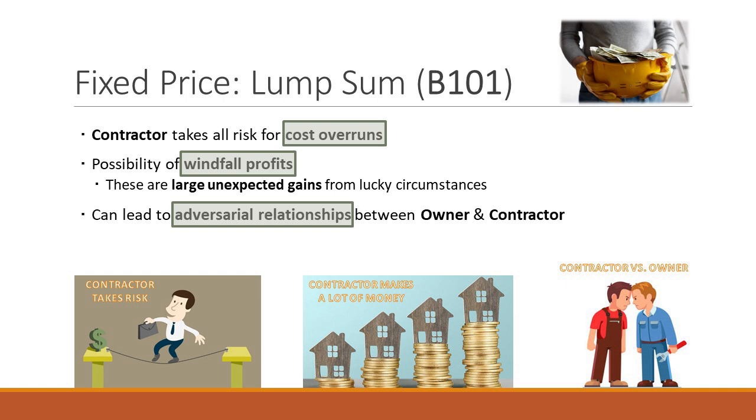So they thought to themselves, when I get to electrical, I got to dig the hole, and I got to build the structure, and I got to dry it in, and then run the conduit. And finally, 6 months into the project, I'll finally start pulling my copper wire. Well, 6 months down the road, the costs were really expensive. And the contractor goes back to the owner and says, hey, you have to pay for this. And the owner says, no, I don't, because you signed a lump sum contract. Well, no, my design hasn't changed. So the contractor started getting hits on that. So what ends up happening is that the contractor will then come back and say, well, this is a change in the economy.